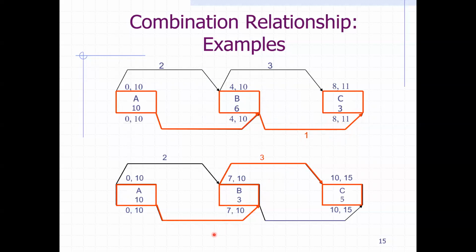And the same scenario here, when we have these 2 activities start with 2 days lag. Now, if you notice, the early start of B is 7. This is the case of contiguous activities. So A starts and continues until it finishes at day 7, where B can start. But we're still giving it a 2 day lag for B to start.